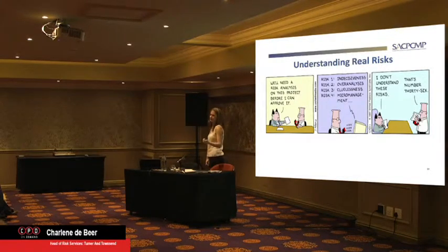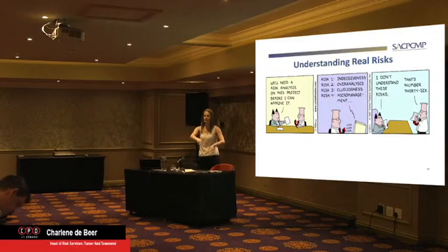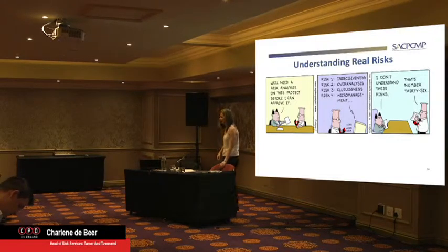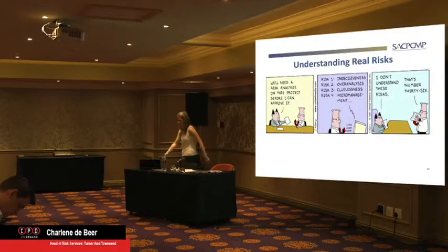Now firstly, the risk manager doesn't do a risk assessment on their own. They have a forum, so they have each discipline there. They have engineering, procurement, design, detailing, construction guys. They have everybody around the table, commercial, and they say, well, what do you feel poses a risk? But this exco guy, this director, he just said, you just go and do the risk assessment for me. So this guy's going, and he's just putting his own little risks down.